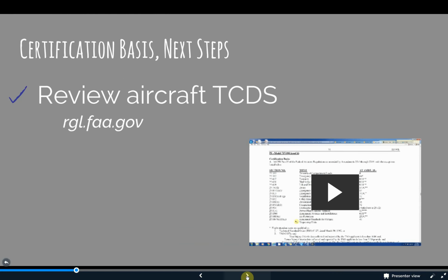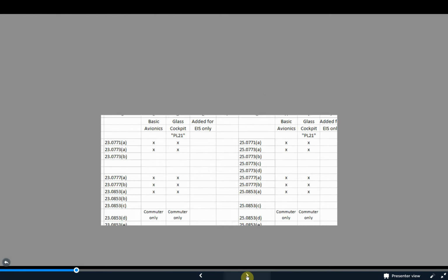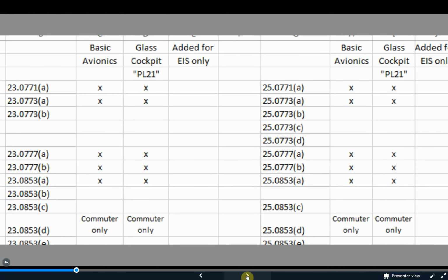We do this for each regulation that is applicable to the project to create a compliance checklist using a project database, which we'll cover in the Tools module. You may be asking, how do you know which regulations are applicable? We've developed some standardization checklists that show which regulations are normally applicable for similar projects. There will be differences between projects because of unique elements, but these checklists serve as a starting point so that we can be consistent across like projects.